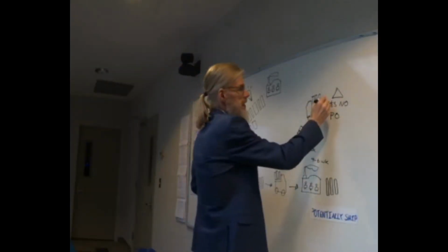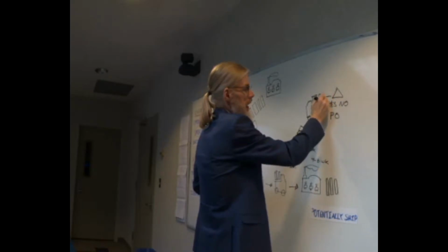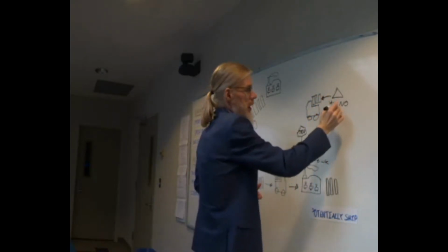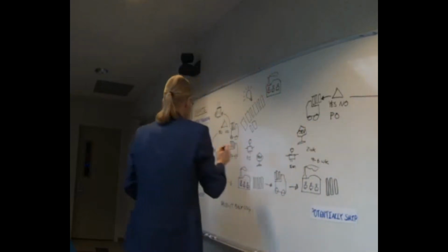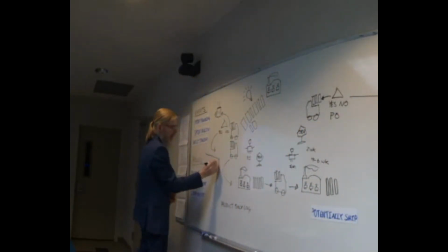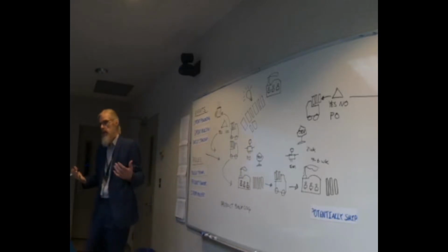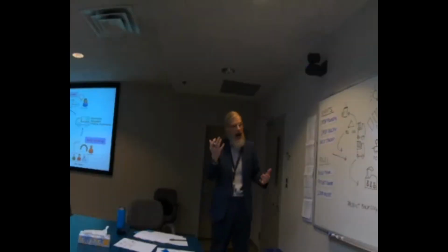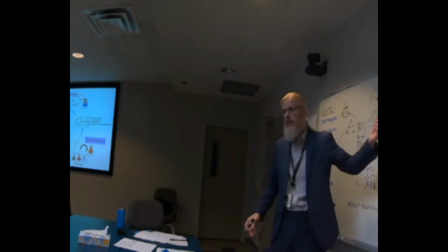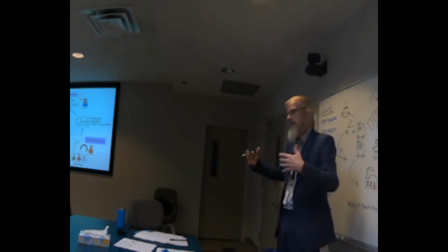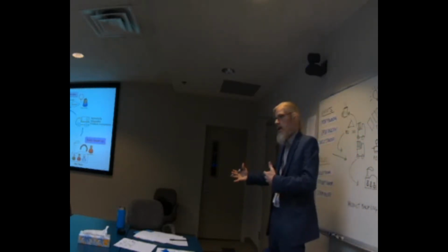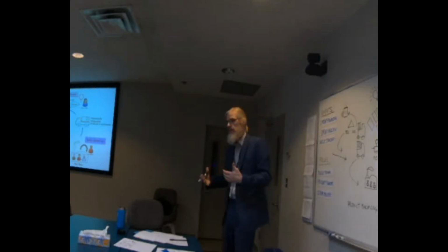So if this answer from the PO is yes at the review, then it'll get loaded. If it's no, most likely it'll go back into the backlog and get changed, okay? Iterative process. Now, I have not myself seen a lot of no's, but we do see a lot of yes, but. We see that a lot, okay? Yes, we like what you did, but you know what?